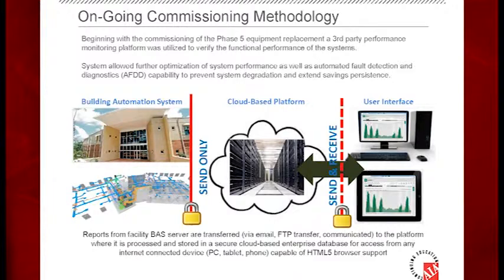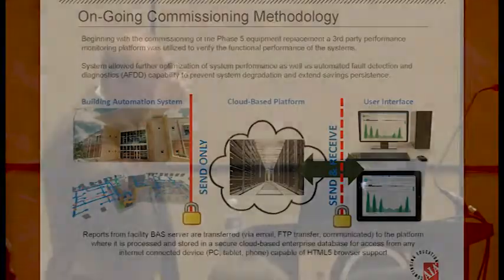So the way that this works for us is that we have an ongoing fee structure with our client. We have a monitoring service fee that we usually bill on a quarterly basis. And we also have an investigation allowance. That investigation allowance is so that as we find things, and it's not maybe clear-cut exactly what the problem might be, they can use that allowance to send us out to the job site. Well, why don't y'all look into that further for us? That gives them an in-place mechanism to utilize us. And it gives us more money, so we like it too.